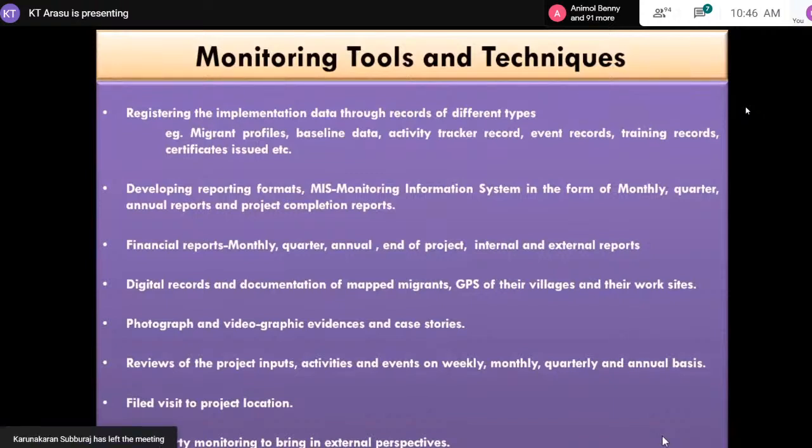In the first year, where they are in terms of their health and other milestones, all these are part of the baseline. To measure a project, if you have baseline data it is very useful, but a little bit costly. There are some quick ways, and an external agency can help you. Baseline is very much necessary to compare the achievement with the end point, the end line data. That is called endline, and there is midline data. All these are relevant, and you have to document them and keep them with you. Baseline data is the starting point.